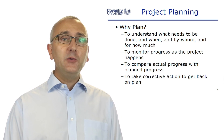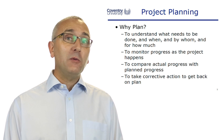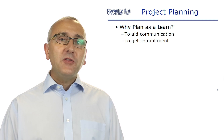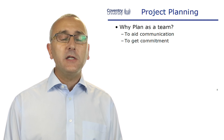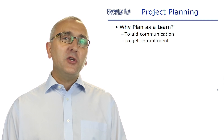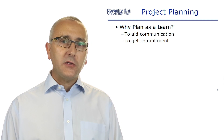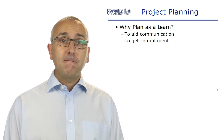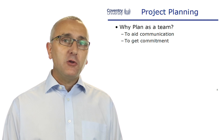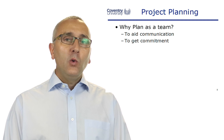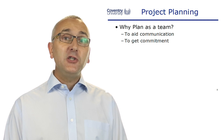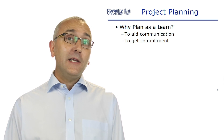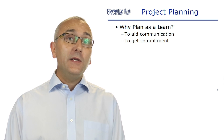We're planning to find out what we're doing, who's doing it, how much, and in what sequence. But we're also planning so that we can monitor progress against the plan. I would encourage planning as a team — get the team to help you create the project plans. It's going to help the communication process, because people will talk to each other about what they're doing, what needs to be done, and the sequence of activities. By talking, we flush out all those problems, and it gains the commitment of the team for the project — it becomes their project plan. One of the worst things you can do as a project manager is to disappear into your office, fill out a Microsoft Project plan, hit print, give it to your team members and say, 'that's the plan' — and they're thinking, 'that's your plan, it's not our plan.'